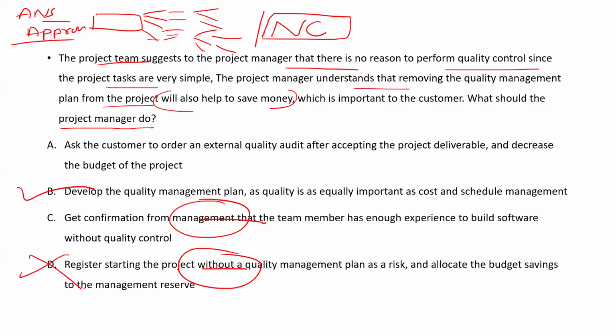You cannot remove it. In which document do we write down that this is my maximum, this is my, yes, exactly, fills stakeholder appetite. And in which document do we mention stakeholder appetite, tolerance, threshold? Now I gave you the hint. You should be able to answer it. In the risk management plan, not the risk register, we define the low, medium, and high, that how much I can skip.